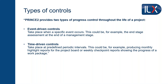Those are the themes — the basic tools. PRINCE2 says all projects require a minimum amount of these seven themes. How are you going to use them in your particular project? A light touch or a lot? It may be a relatively short project with two stages but lots of risk, in which case you might have a much more thorough risk management structure. The customer may be very unsure what they want, so you might need a very effective and rapid change control process. Each of the theme chapters in the PRINCE2 manual offers guidance on tailoring — how you might use these in different circumstances.